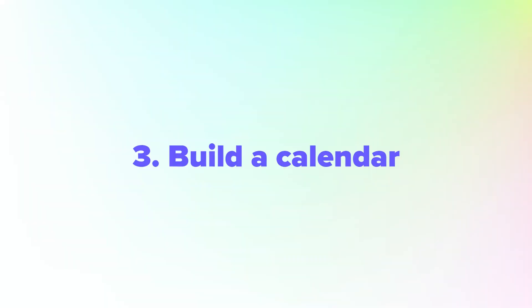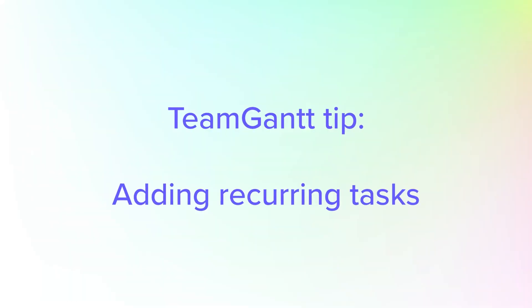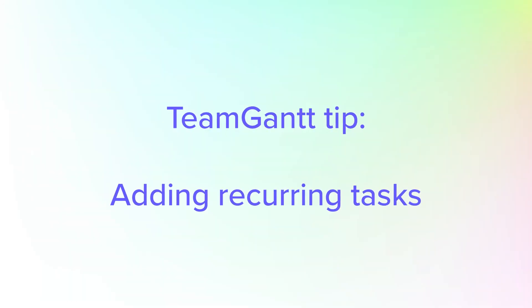Do you have an ongoing project with regular deliverables? Consider structuring your work into a calendar format by organizing task groups by month and date. This approach can be especially useful for creating a social media marketing plan or content calendar for your blog, like this example.